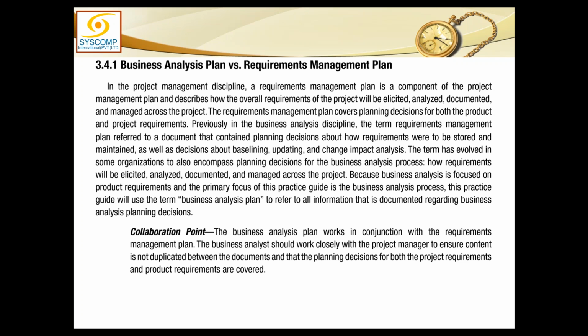And one of the reasons why we are creating this requirement management plan is because the people we are collecting these requirements from can change their mind anytime. And when they do, we have to keep a configuration record of what has been changed, when, and by whom. And how does it affect the project?